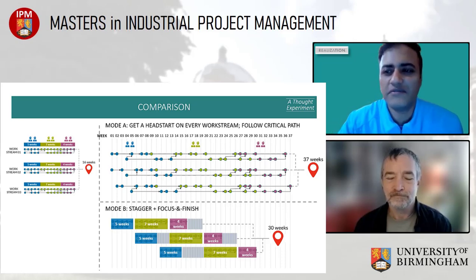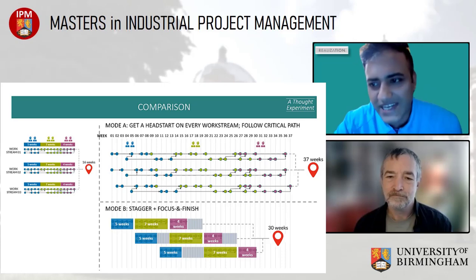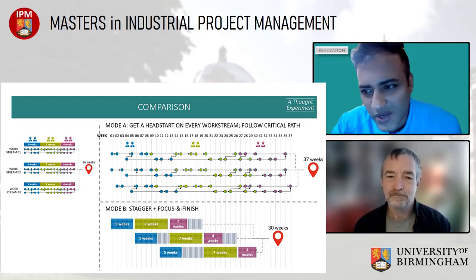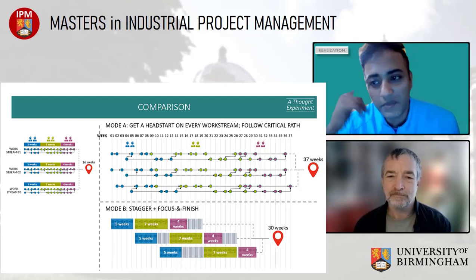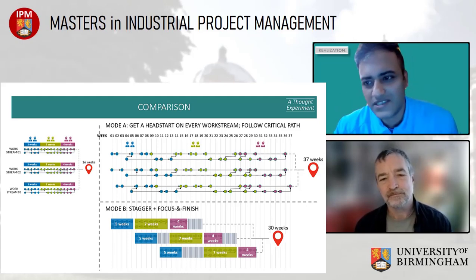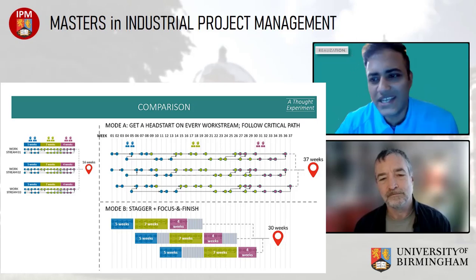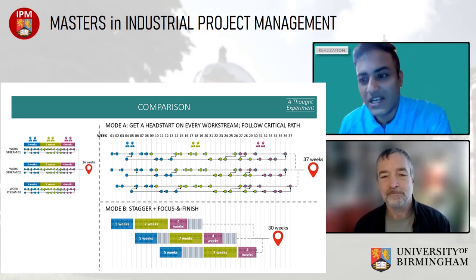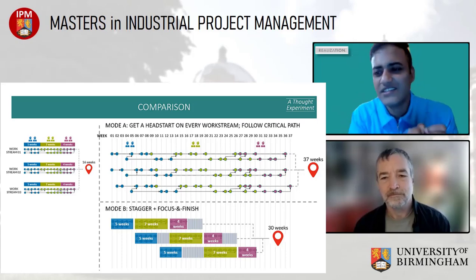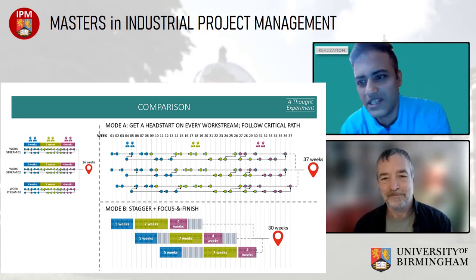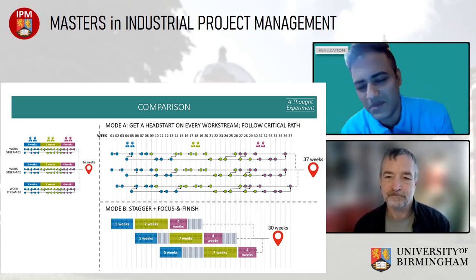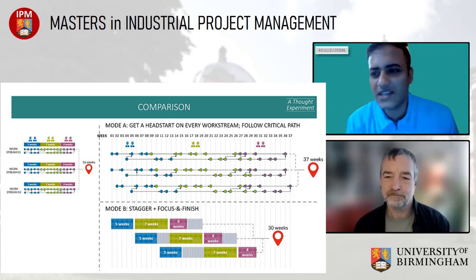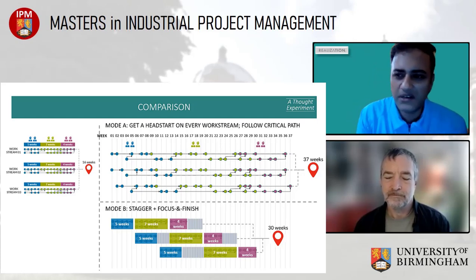So we also have multiple tiers. So even the second tier is slightly high level, not the absolute dot or the drawing number or the drawing name on which an engineer is going to work. So that's even a level below. And reporting of progress is also happening at that level. So people are saying, I have submitted this drawing. Or somebody is saying this drawing has been approved. But how does it link back to even the small set of drawings that we are talking about that has to be released to civil works? That is one problem. And then bringing it up to the batch level is another layer. So we have multiple tiers.